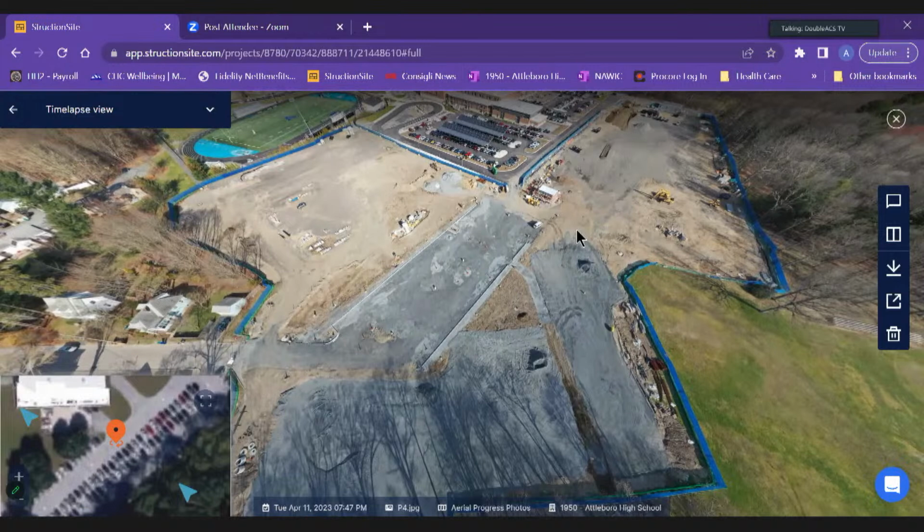But the plan is to pave all that gray area with binder coat in early May. And then finish coats would go in the summer. And then, as I talked about yesterday, at the tennis courts, the court surfacer, the finish paint that goes on the tennis courts, they bumped us a month in their schedule, so they won't be starting until the end of August. So those tennis courts will not be available for use until the end of September. But all the fencing would be complete, all the hardscape will be complete, it's just the painting of the tennis courts would continue into September.